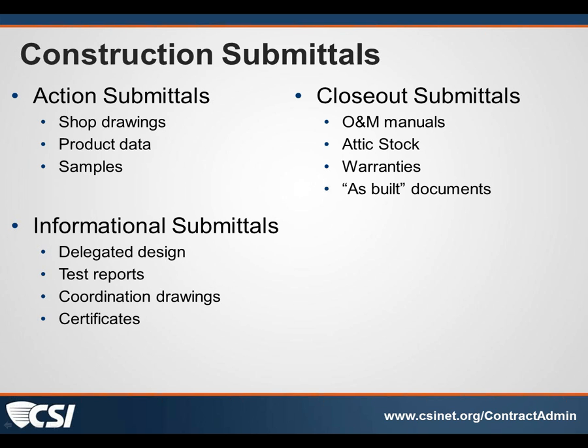But they're becoming involved in the construction phase all the way through to the conclusion of construction. The O&M manuals are being built as early submittals now, maybe not closeout, so that they can be used to do testing and balancing as consultants are at the table to do that, and also operational engineering, the word I can't think of.